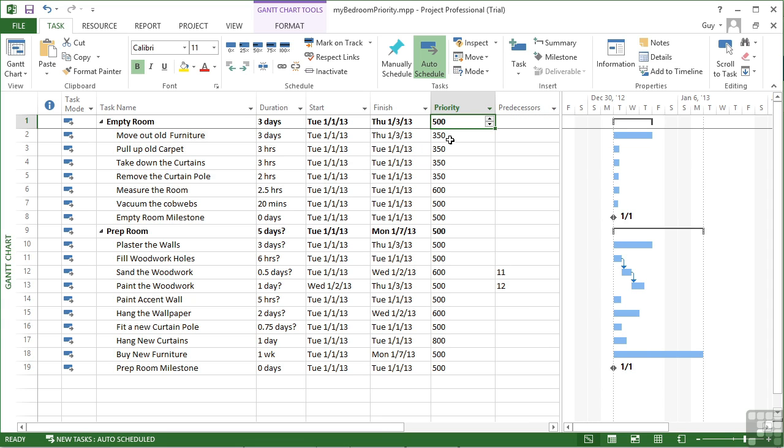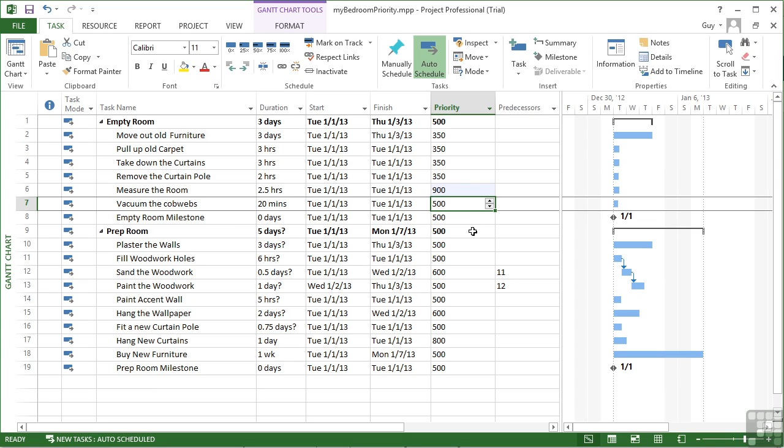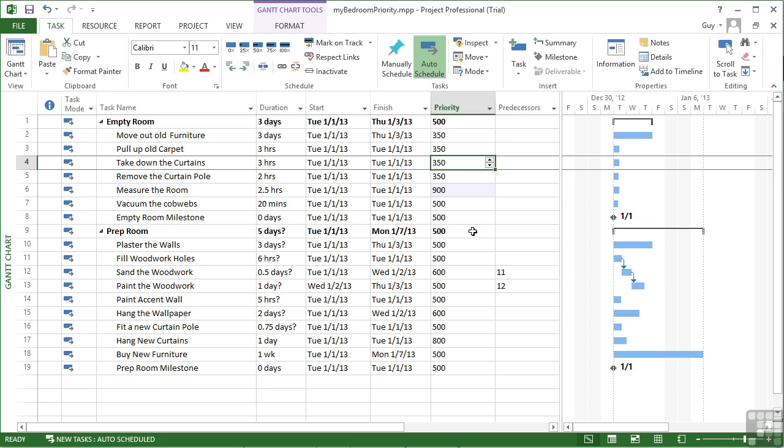And that will then put the priority numbers in for me to see in the task pane here on the left. Not only will it put them in, it will allow me to change them. So if I want to measure the room to become very important, go up to 900, and take down the curtains and come down to 200.